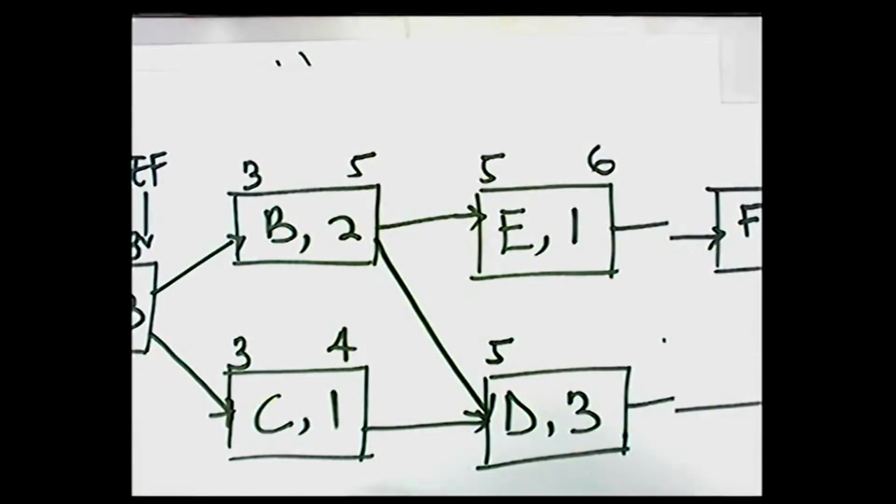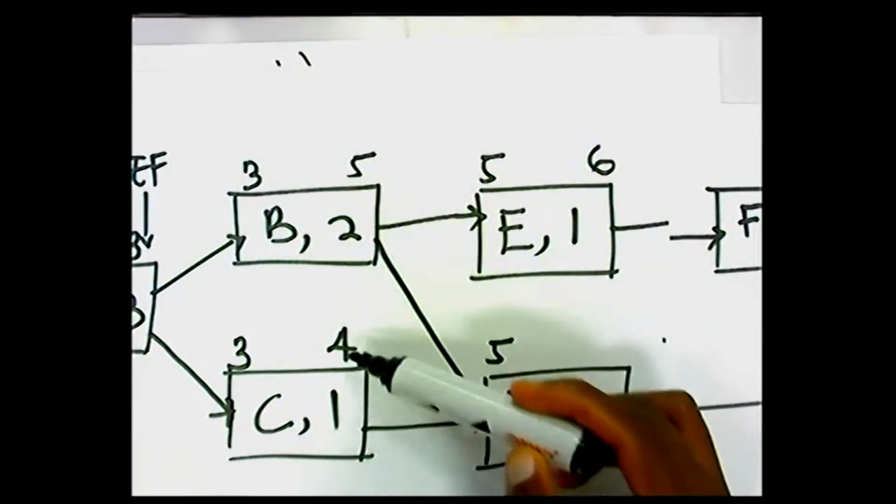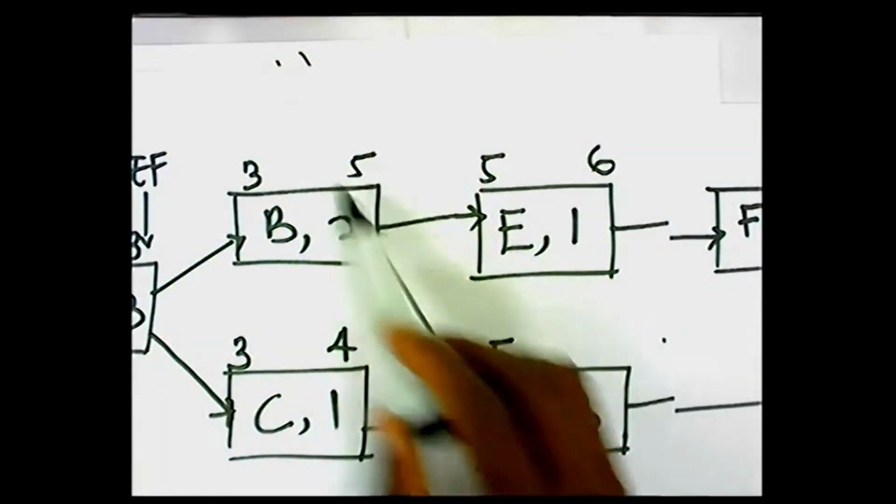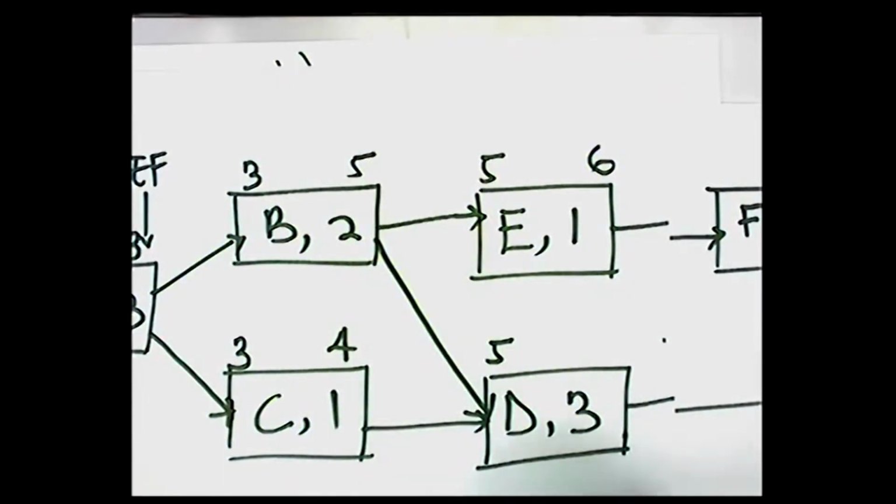If you got that right, I hope you should be giving yourself a big thumbs up. What this is saying is that if this needs 5 months to be completed and this needs 4 months to be completed, we can only start this when the activity with the longest time is completed. Consider the case of, I think we all like birthday parties, so let me use that one as an example. If the birthday person has to cut his or her cake, we need our guests to be seated, and we also need the cake to be available before we can call the birthday boy or the birthday girl to cut the cake.